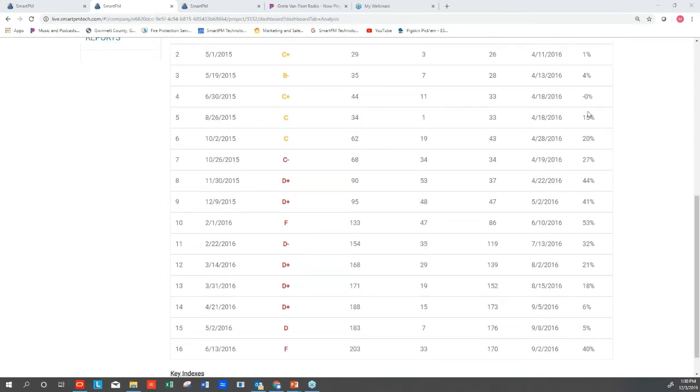What you can see right here in this example, we're seeing changes happening, keeping compression going up, but then all of a sudden in this one point in time, the end date just blows out about 40 days, close to 40 days, whereas the delay didn't even reach that much. Looks like there's about 21 days of additional delay and about a 40-day kick out at that point in time.